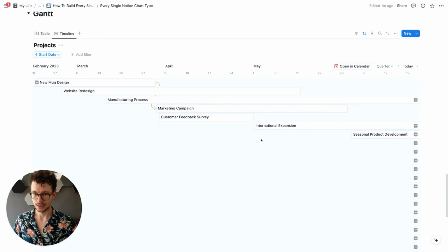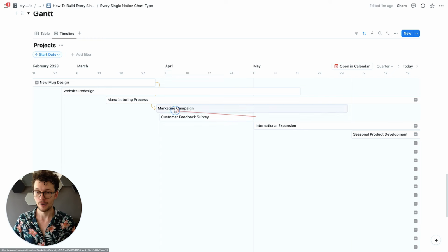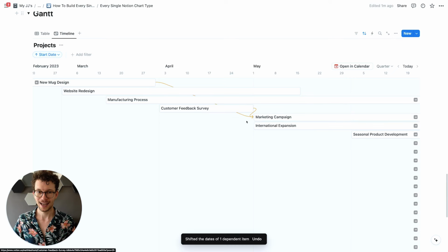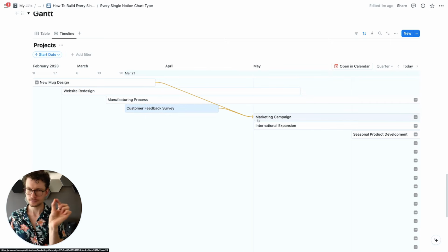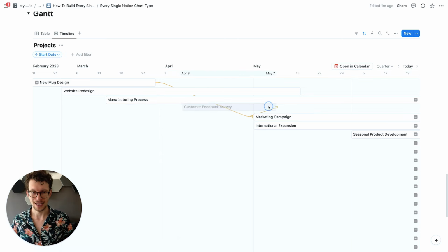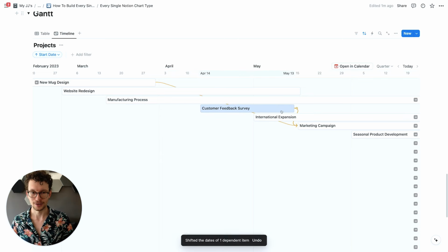Same with the customer feedback. Maybe the customer feedback survey actually needs to be done before we start our marketing campaign. So again, I will drag this here. Sometimes it's a bit tricky to get it to the point where it needs to be. And it also automatically pushes the marketing campaign even further back, because our customer feedback survey needs to be there. One important thing is it doesn't work the other way around. So if I move this here, it won't push this back, because I didn't say to always keep the same distance. I said to only push it if we have a later start date. But for that, it works quite well.